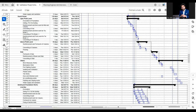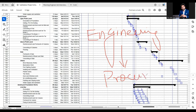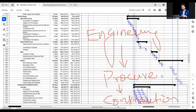First of all, you are going to make your engineering documents and drawings. After these drawings, you are going to take your procurement plans. After procurement plans, you take your construction plans. These scope documents will be the generic ones — they can vary if your drawings differ. But at the major higher level, every substation will have civil work, electrical work, power and mechanical work, though they can vary depending on the nature of the project.